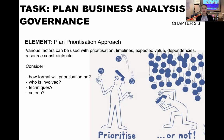Let's look at the element plan prioritization approach — how you would plan to do your prioritization for your initiative. You need to look at things like timelines, expected value, dependencies between requirements, resources, and constraints. You need to think about how formal prioritization will be, who will be involved in prioritization activities, what techniques will be applied, and what the criteria will be. Later in the BABOK guide there is another task that goes into quite a lot of detail around prioritization, so we will talk about that again.